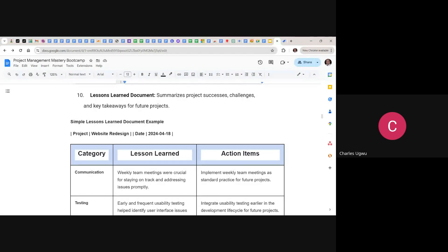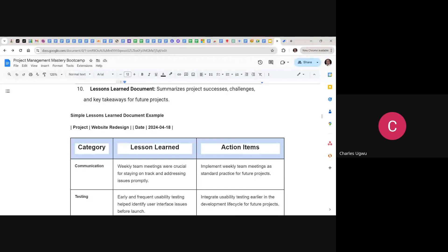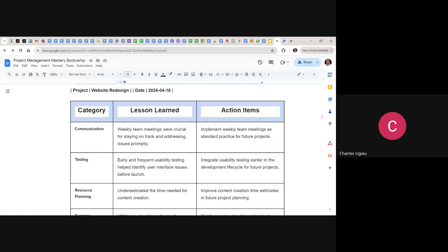This is how we do it. The project here is website redesign. Looking at the communication lesson: weekly team meetings were crucial for staying on track and addressing issues promptly. So the action is to implement weekly team meetings as a standard practice for future projects. As a project manager reading this document, you start picking up what you need to do in your own project.